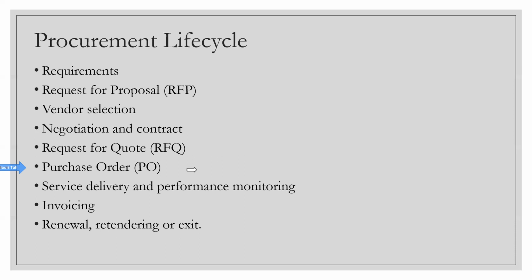But when you reach that stage, you will also find at the bottom of the sheet, they will give you some term called miscellaneous, and they will add some $1,000 on that. So in those kinds of cases you have to be careful. Why? What is this miscellaneous? Miscellaneous can be maybe some nuts and bolts and some accessories for which they don't have a SKU number or a part number, right? But miscellaneous can also lead to thinking that you are probably adding a lot of not so required things into that value of the code to make it a higher number. So like this, you vet the code.